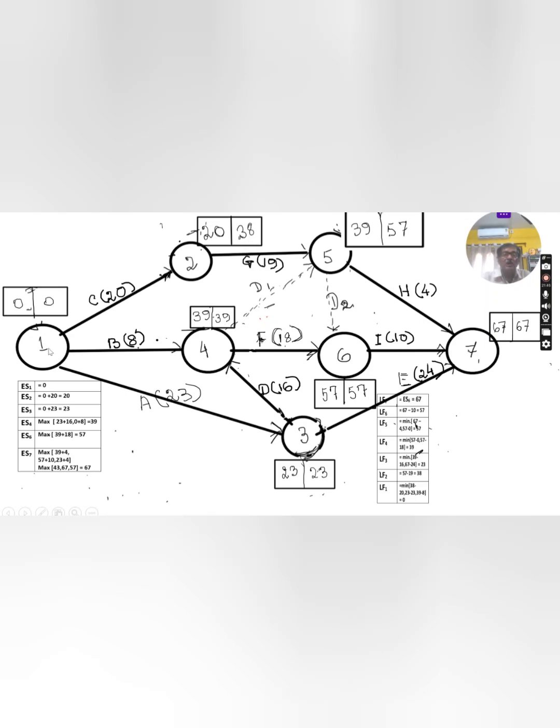Now LF1, latest finish time LF1, how will you compute this? 3 activities are coming out, one by one. Which? 1, 2, 1, 4 and 1, 3. First we look at 1, 2. Latest finish time 38 minus 20, 18. 39 minus 8, that is 31. And 23 minus 23 is 0. So out of the three, the lowest is 0. That's why this is the latest finish time. This is the logic. If you enlarge it a little and look, then you can see, and you can compute also.